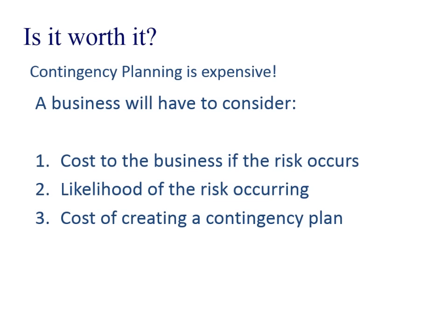It might be something ridiculous like every single server going down at the same time. Although that would be really devastating for the business, if you've got storage servers in different countries and different external businesses doing your data backups for you, then the likelihood of them all going down at the same time is really, really slim. And also, if they all go down at the same time, it's likely a worldwide problem, so maybe everybody's network has gone down as well. So non-ideal, really costly, but a very small likelihood of it occurring, and everyone would face it anyway, and maybe there's no way of getting around that problem, so you wouldn't necessarily contingency plan.